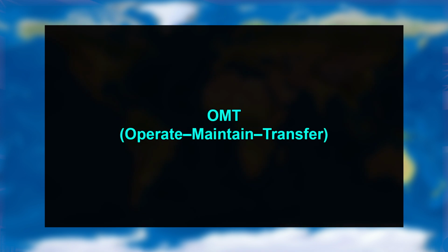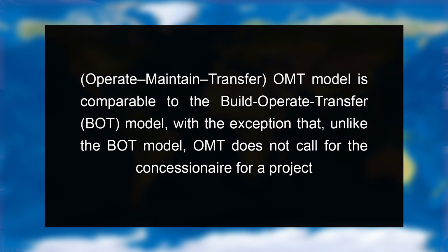Dear students, next is OMT, operate, maintain and transfer. The OMT model is comparable to the BOT model, with the exception that, unlike the BOT model, OMT does not call for the concessionaire to finance a project. For a predetermined amount of time, the concessionaire is responsible for maintenance under the OMT model.